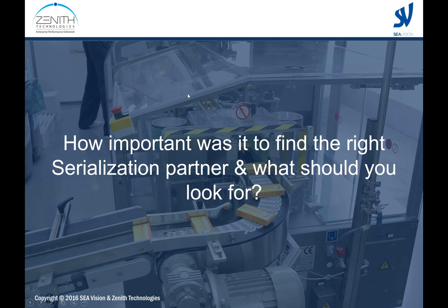Somebody with offices in your regions where you operate, because the time zones also have a big impact on how many hours of active work the project team can do in the day, their resource availability. And then if we're talking about solution partners, it's about their support desk capability, their customer training, and how they approach that with documentation and training materials and training classes, for example, that they can provide to the end users, that is the operators and the technicians that will use their solutions, and the support documentation that goes with that. So again, you can see there's lots of things to consider when looking at different potential serialization partners for your solutions.